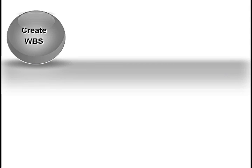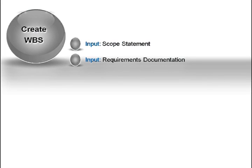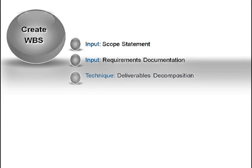The inputs to this step include the scope statement, the requirements documentation, and the processes your organization uses during scope development. In the last video about scope, I explained that the PMBOK suggests you finish the scope statement and requirements prior to starting the WBS. In my experience, it never works that way — you actually create all three at the same time.